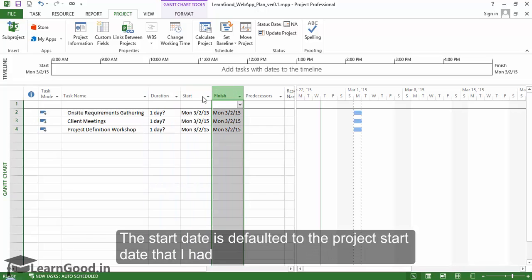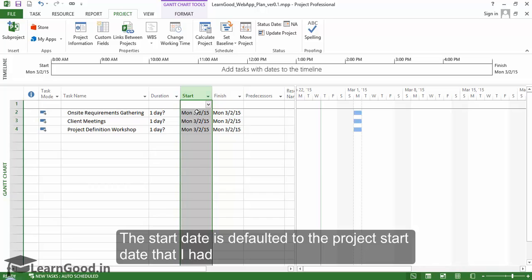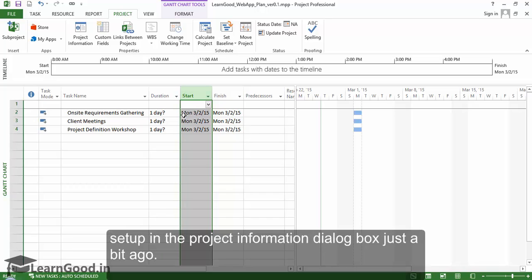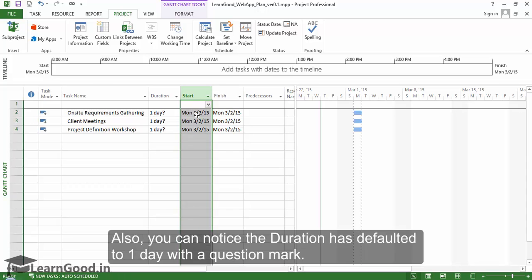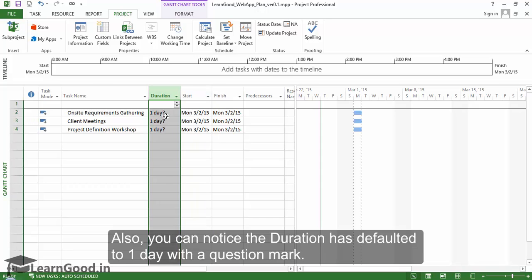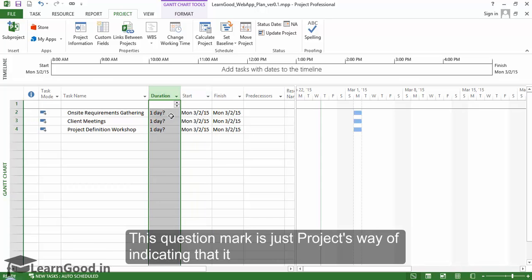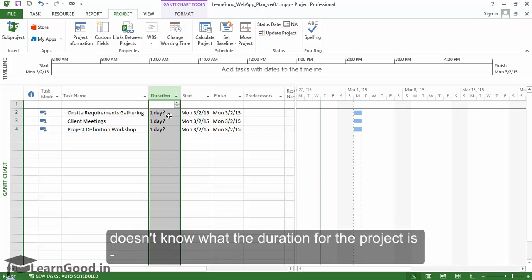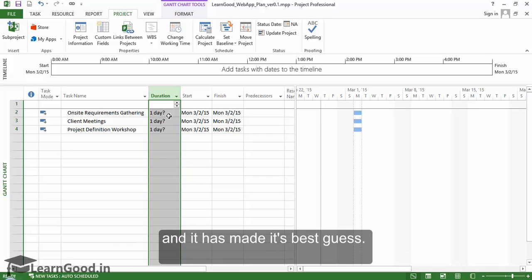The start date is defaulted to the project start date that I set up in the Project Information dialog box. You can notice the duration has defaulted to one day with a question mark. This question mark is Project's way of indicating that it doesn't know the duration, and it has made its best guess.